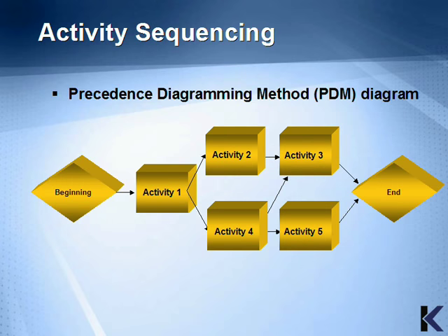In this example, Activity 1 must be performed before Activities 2 and 4 can begin. Also note that Activity 4 must be completed before Activities 3 and 5 can begin. One item that you need to remember for the exam is that precedence diagramming methods don't use dummies.